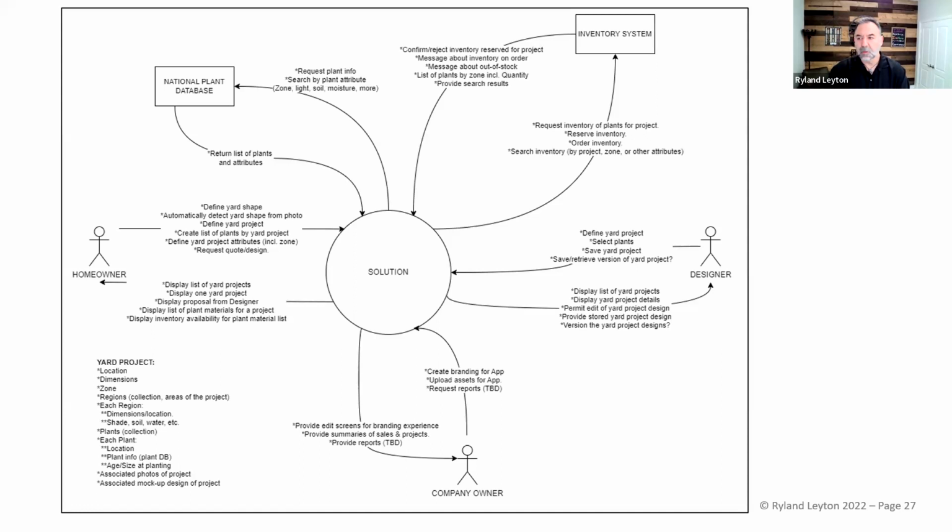That's normal. You can always write it down in addition. A relevant thing here might have been, if it's another team in your company that has the inventory system, you could say, I've got to validate that their APIs are ready for us. I know they were building some of these things. I don't know if they're done. That would be a valid note to take on. You're revealing a dependency. Okay.